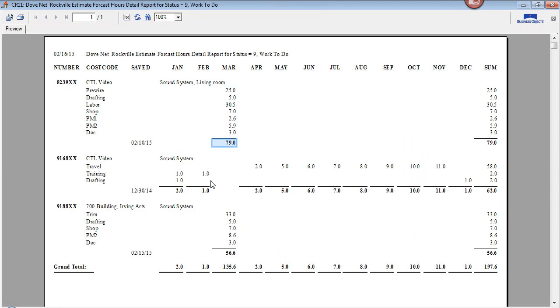And then for the next month, we don't have any time in March, but you see in each of the appropriate months, these are going to be our times estimated with our total expenditure of hours, be it 61 hours, like so. So now we can see that in July we're going to have 7 hours, and in October we're going to have 10 hours. Now if you can imagine, you put this across all your jobs, you can see how many hours are going to be needed, and then you can also weigh it out by type of labor. So this is a very cool report to watch.